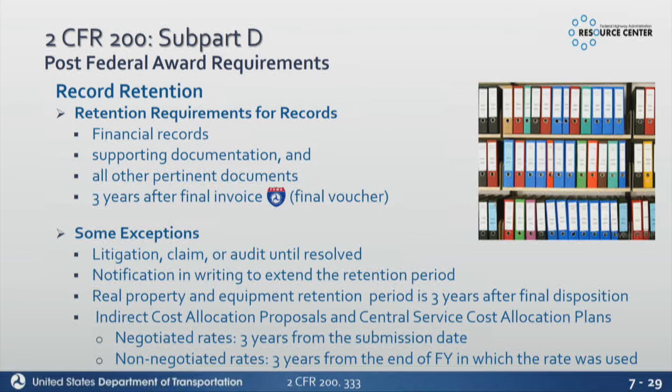So some of the exceptions, we have audits. If there's an audit, you need to keep those records for 3 years after you resolve the audit. Same thing with claims. So if you have a contractor claim, maybe you've closed the project, but there's some sort of litigation or something on that project, you need to have something in your system that'll flag that to not allow you to dispose of any records or start that disposition until that litigation is complete. Once the litigation is complete, even if the project's closed, the 3-year time period starts when that litigation's done. So you have to have just a method to track those kind of things.